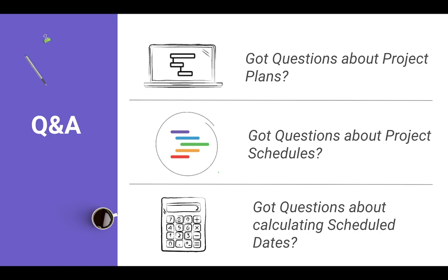Depending on the dependencies that you have set up and the dates of all of the other downstream tasks and milestones, some of them will change. If they're linked to the task that you change the dates on, they will automatically change. But sometimes you will need to manually adjust other dates if they're standalone. They don't have a dependency related to the date that you shifted.